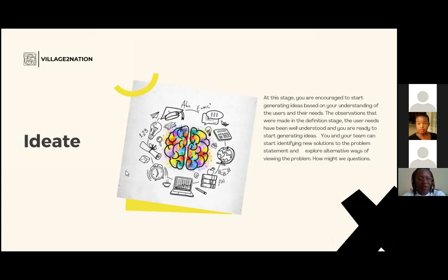Personally, I'm in the construction industry. Before we start our projects, the first thing we do is public participation, where we interact with the end users. You get to know their challenges, you get to understand their expectations, and you get to understand their own layman solutions to the kind of problems they're facing. And then from there, we bring in our technical expertise to help solve their problems. If it is, let's say, a structure they want done, we come up with our expertise, but bearing in mind the challenges and the layman solutions that they presented.